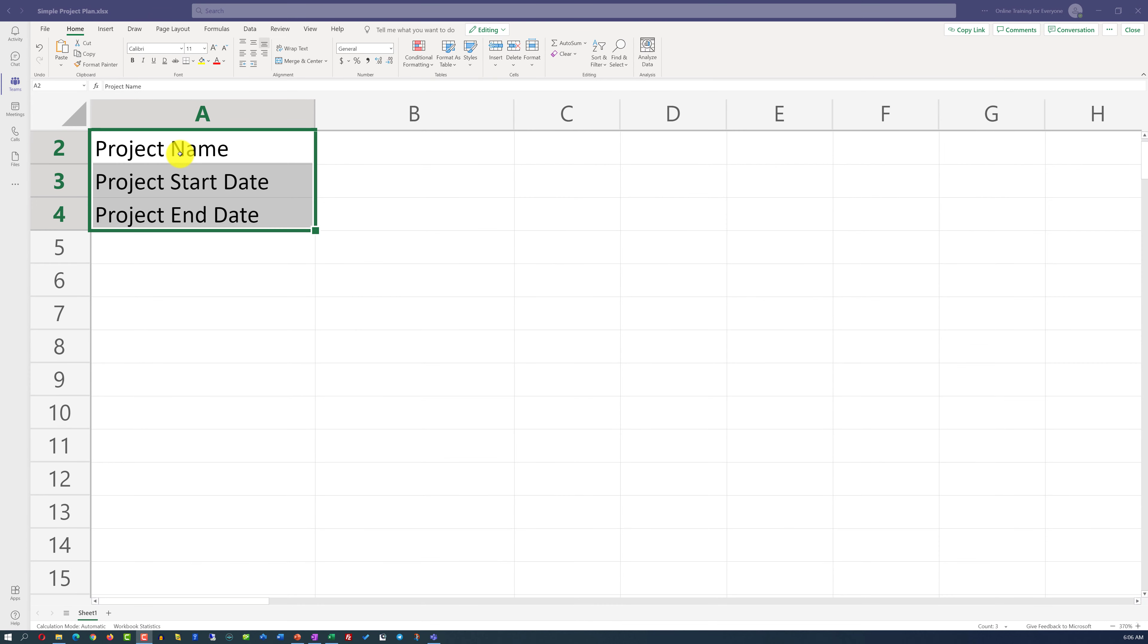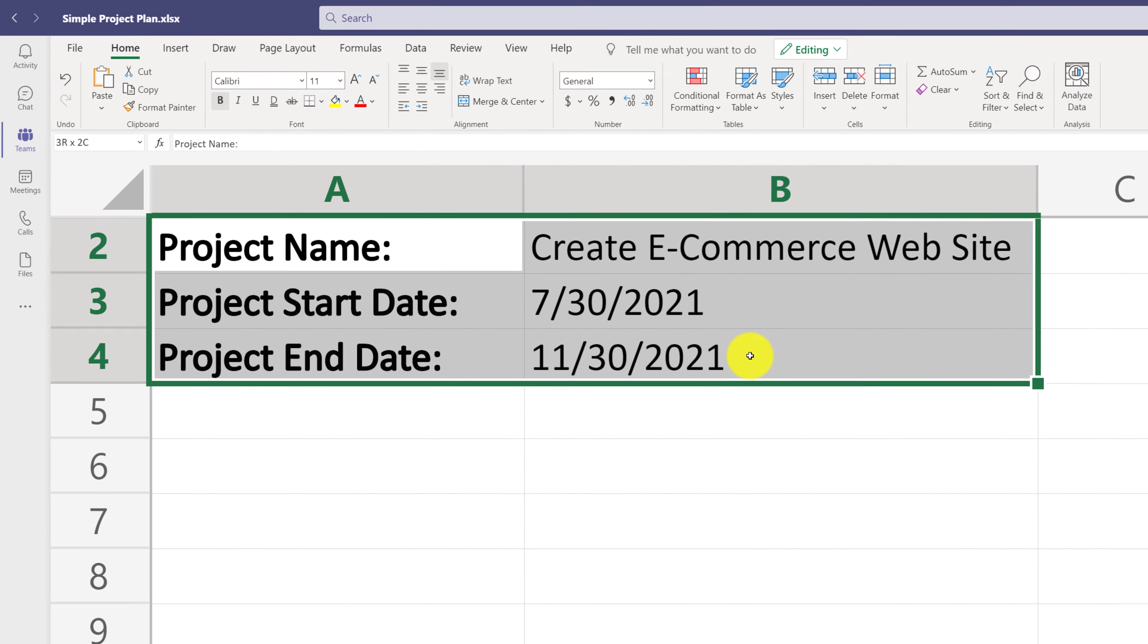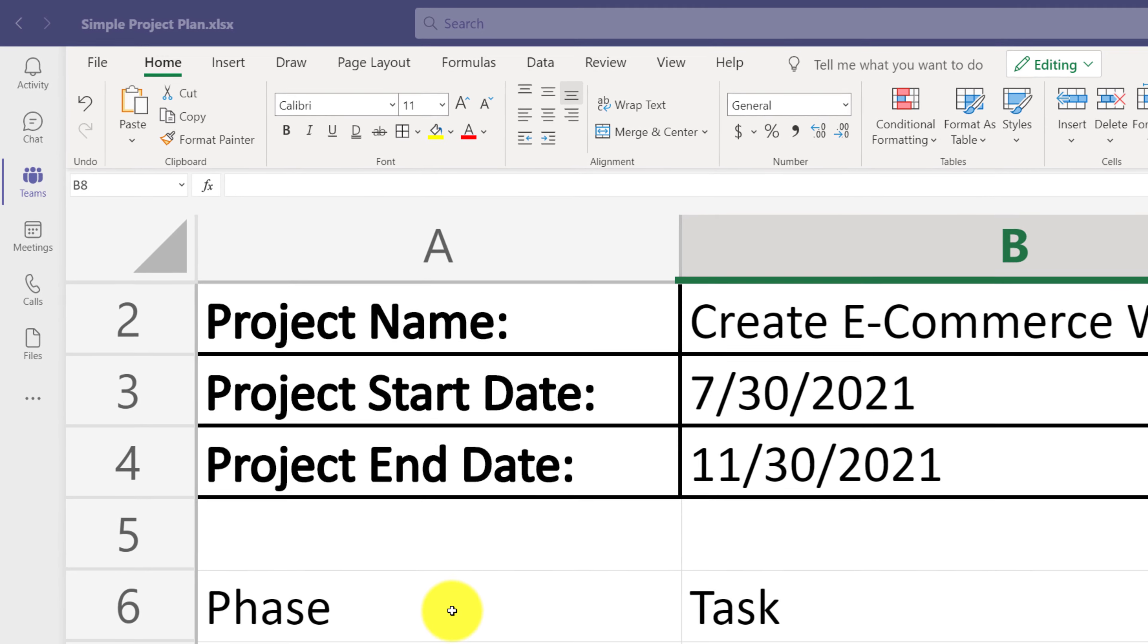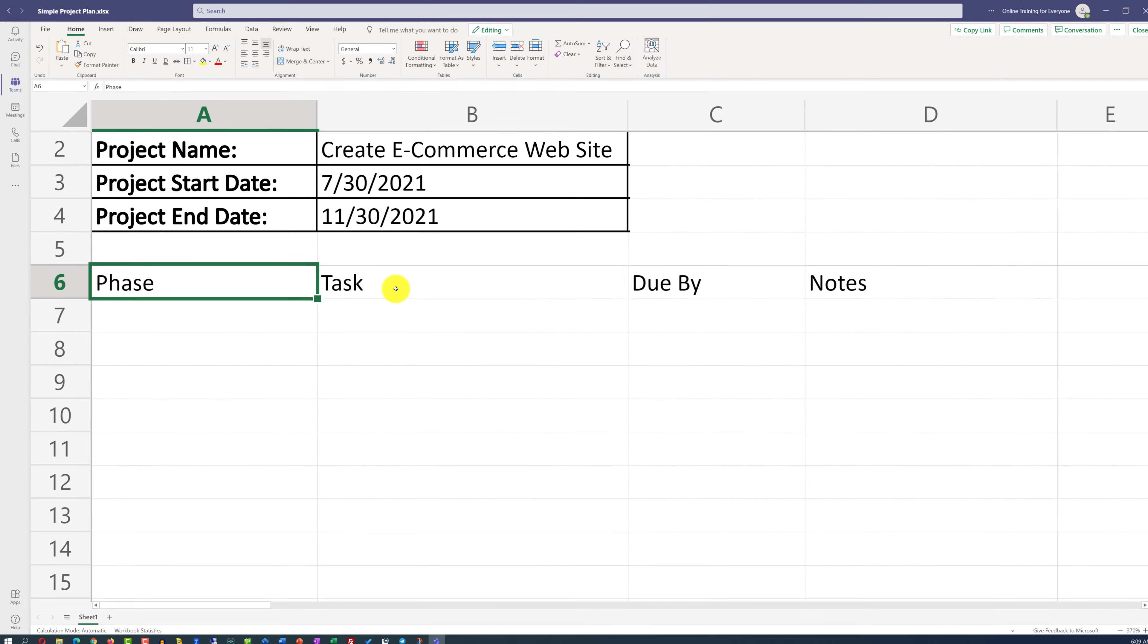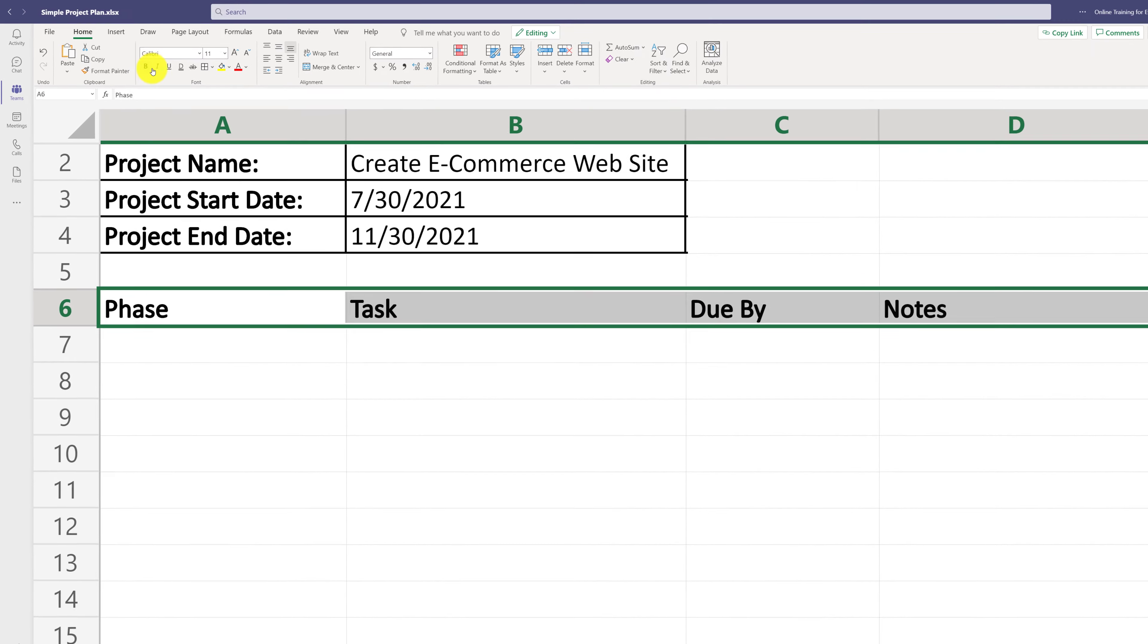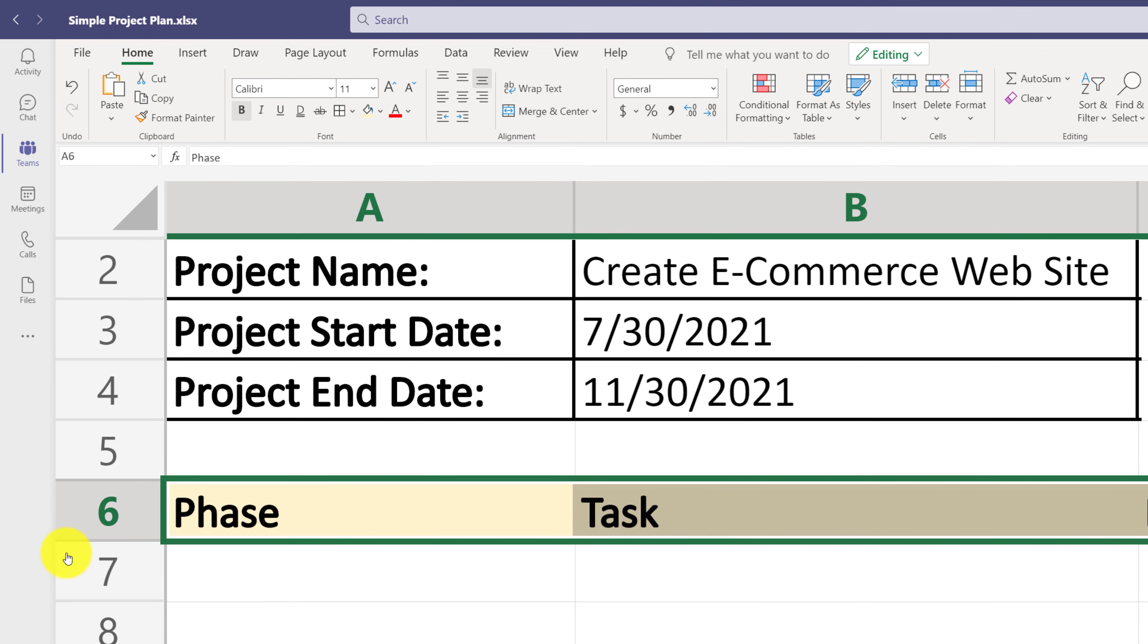Once inside the Excel document, I am going to capture project name, project start date, and project end date. Once I captured all of this information for my e-commerce project, which starts on July 30th of 2021 and ends on November 30th of 2021, I can format the cells. And I do it by selecting the cells and selecting the formatting style that I want, which would be all borders in my case. There are going to be multiple columns in my project plan. One column will capture the phase of the project. The next column B I will use to capture the task information. Due by information and notes information will be captured in the columns C and D. Once I highlight all these cells and then select bold, as well as change the color, I will end up with the meaningful heading for my project plan and can actually start focusing on the actual tasks that I need to capture.